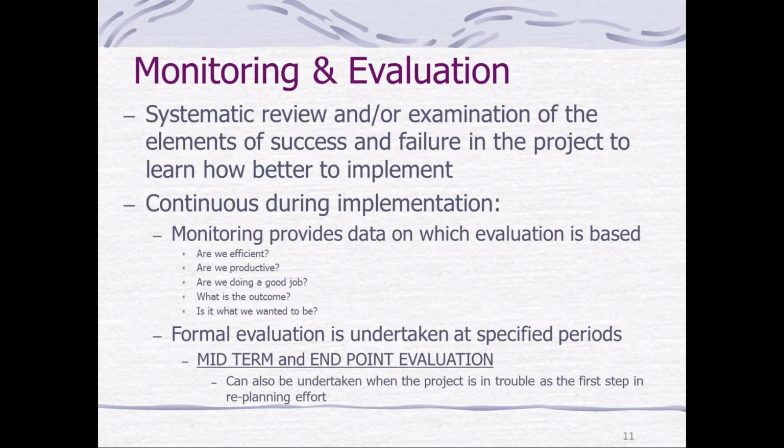Continuously during implementation, you monitor to provide data on which evaluation is based. You look at, are we efficient? Are we productive? Are we doing a good job? What is the outcome, and is it what we wanted it to be? Formal evaluation is undertaken at specific periods of time as designed in the project plan. Usually, there's a midterm and endpoint formal evaluation. This can also be undertaken when the project is in trouble as the first step in replanning the implementation efforts.